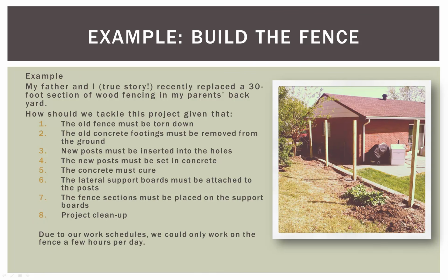Then the lateral support boards that go horizontally have to be attached to the posts. And then the actual fence sections must be placed on those support boards or hung on those support boards and then fastened into place. Then, of course, we have project cleanup. Otherwise, my mother would kill us both. Now, due to both of our work schedules, we could only work on the fence a few hours per day. So we really had to think about how to plan this project.